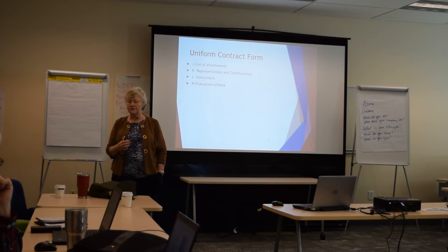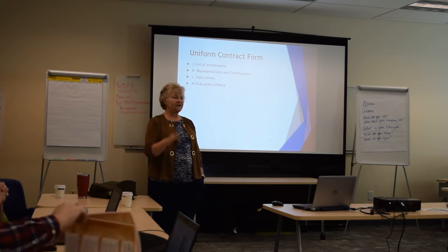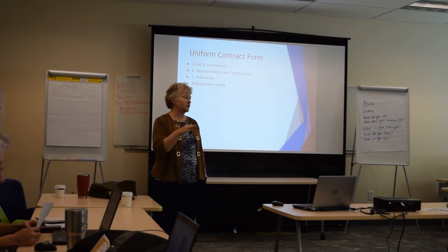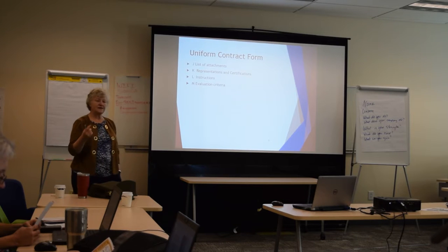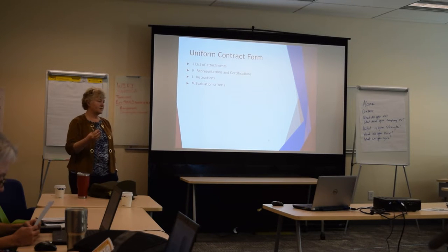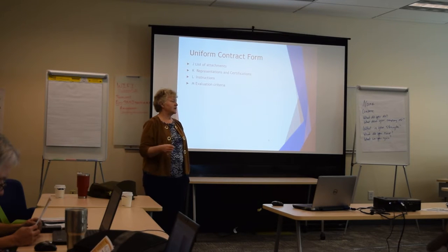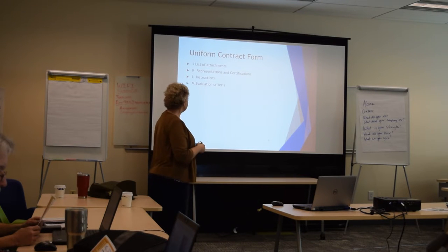But what I would do when you decide you're going to pursue a particular RFP, I would go to FedBizOps and pull down everything from the site and onto your hard drive. And I would just put it as version one so that you know everything that happened as of that date. This was the current set of files. And then I would just get in the habit of checking, if it's an active procurement that you're going after, every day in the morning, just check it, see if any amendments have been made. Because you want to be aware and be able to seize the moment of any amendments and then just keep an ongoing updated file on your hard drive. So that in case you ever have any issues, you can go back and figure out where the problem stemmed from.